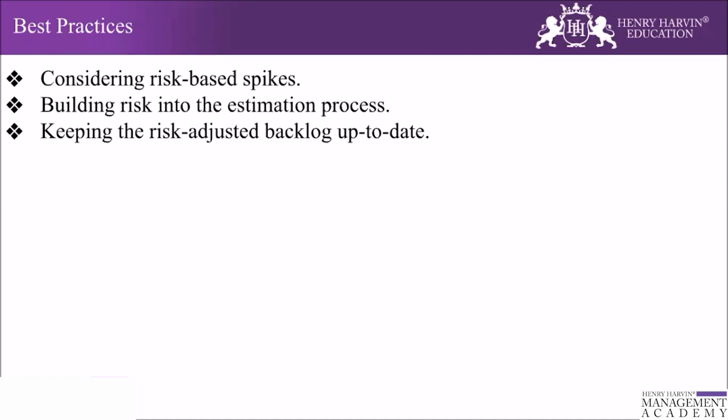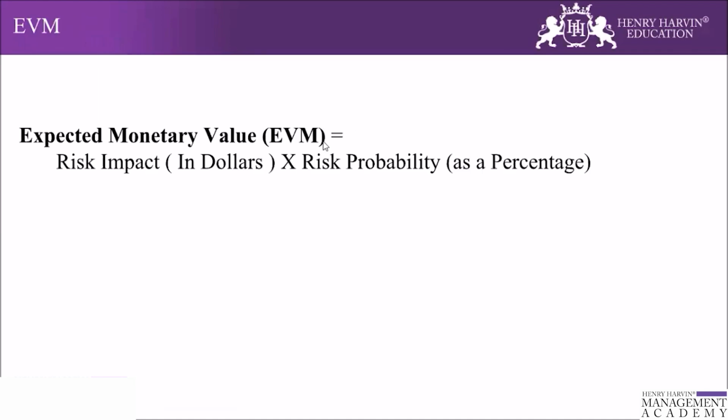If you ask me, we are not focusing on the precision of the number. A guess multiplied by a guess is unlikely to be highly accurate. The purpose of this exercise is to facilitate a better discussion with the business representative about how to best sequence the work items. If people start rigging the numbers for a personal agenda, the true power of the process will be lost. The technical dependencies and the sponsor mandate will take precedence over the sequence derived from this approach.